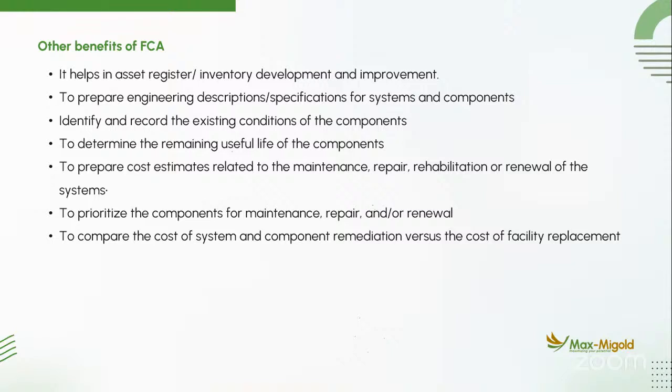Another benefit is to compare the cost of system and component remediation versus the cost of facility replacement. So when you do your cost analysis and you find that the cost of maintenance is almost equivalent to the cost of replacement, it is of economic advantage for you to go for an outright replacement. But you cannot make that decision until you conduct a condition assessment.